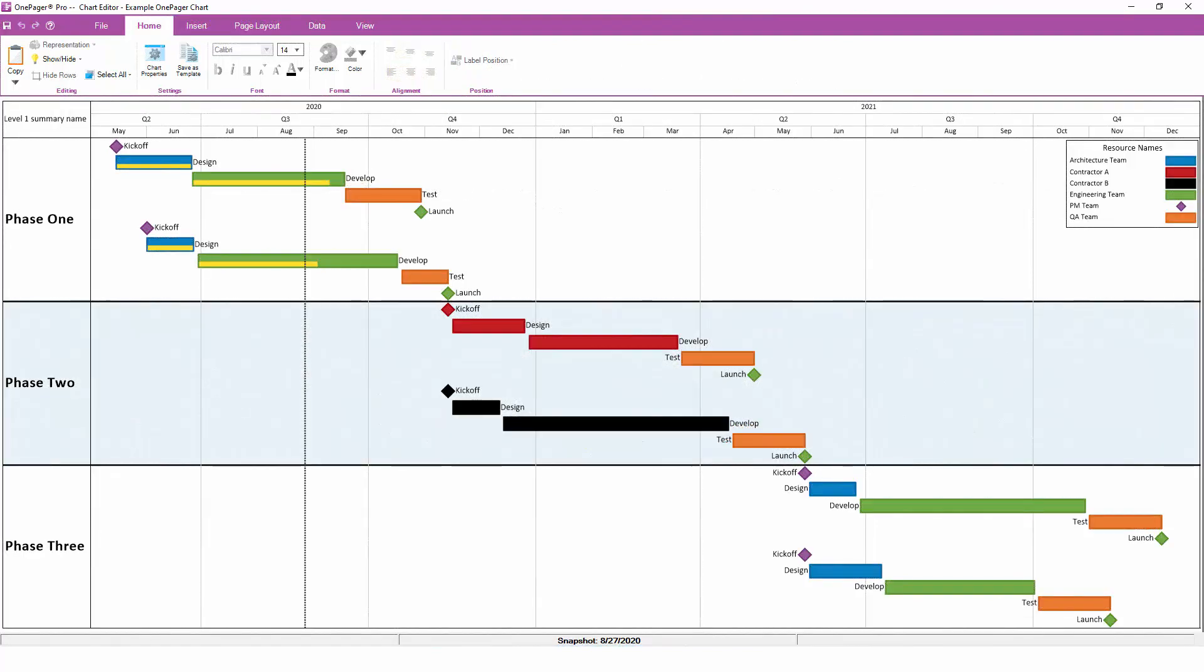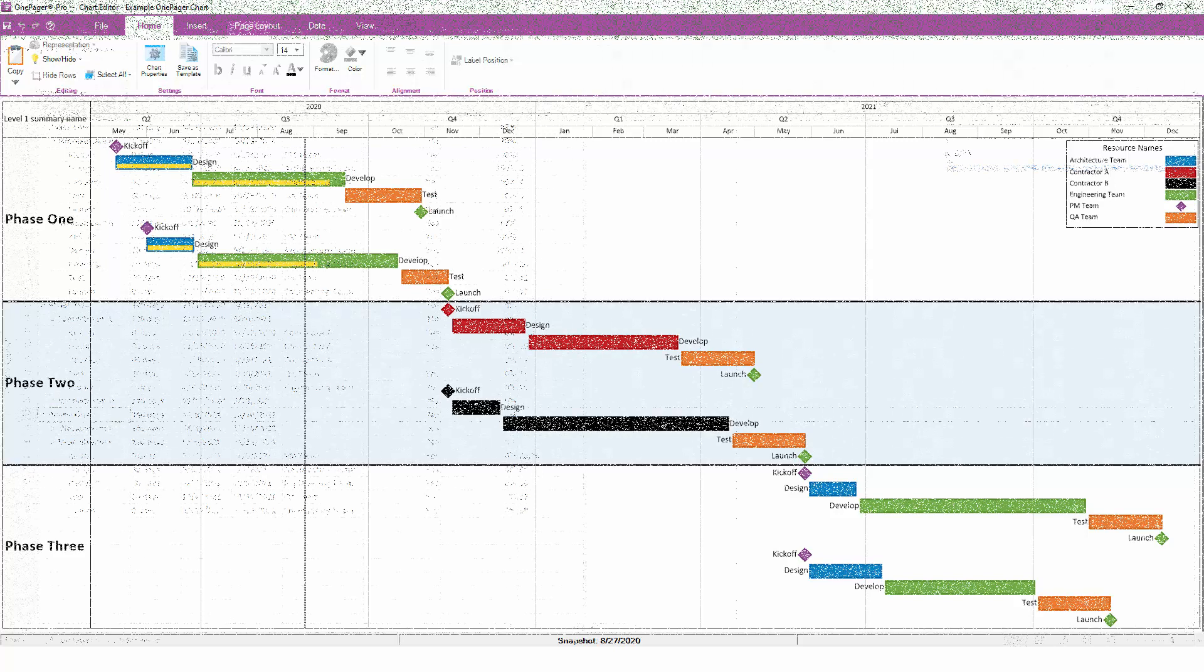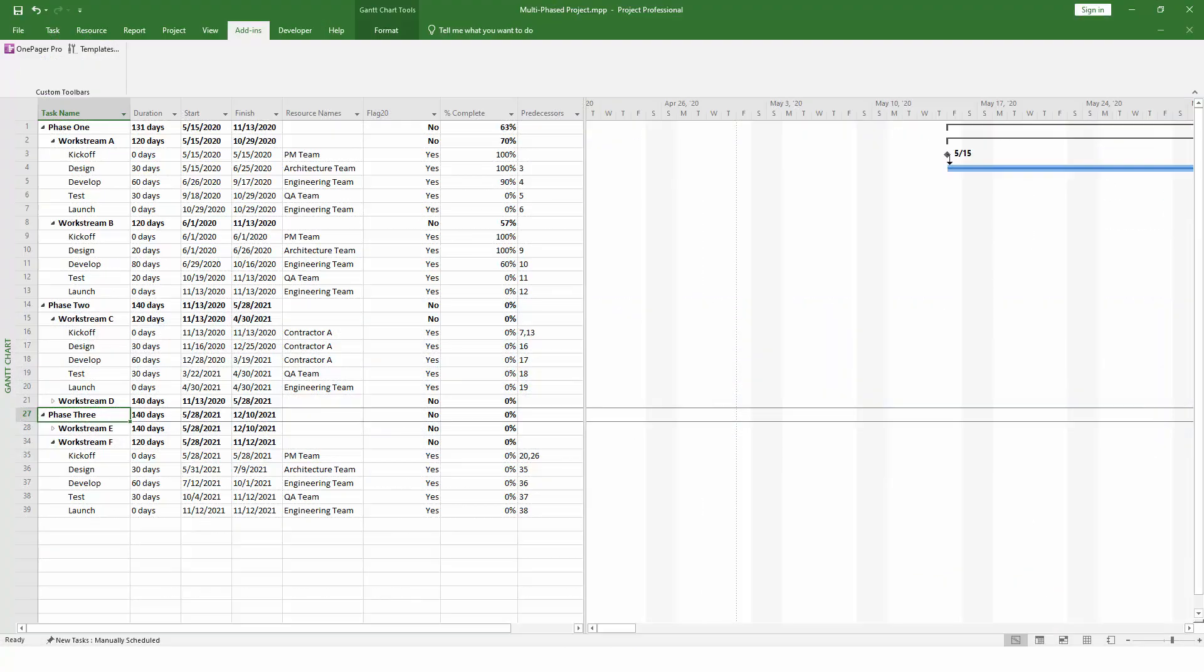Let's take a look at the swim lanes on the left-hand side of the chart. By default, OnePager is going to group your swim lanes based on the Level 1 summary name, which is the top-level parent task back in Microsoft Project.